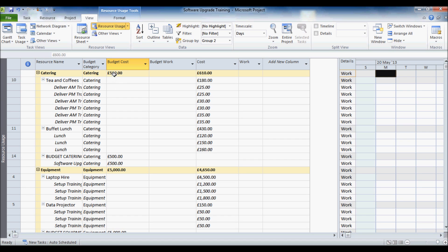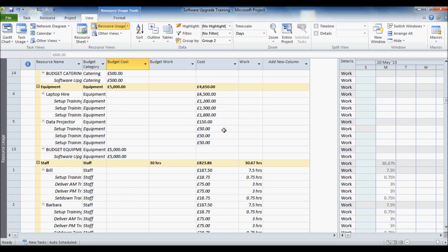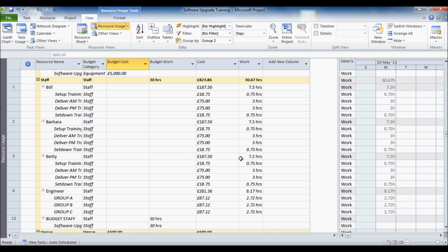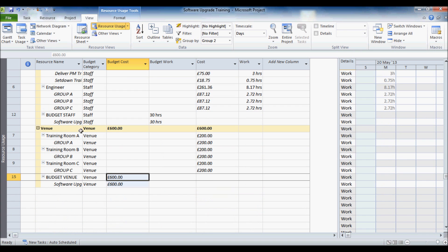And we have now got the budget cost there against what the catering resources are going to combined cost. So you can see that I have got an overspend here with equipment. Budget cost is 5,000. The actual cost is 4,650. So I have underspent there. Staff was 30 hours. Actually it is 30.67 hours. And the venue that was dead right.